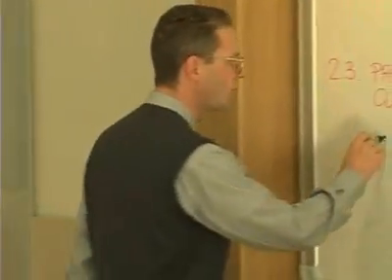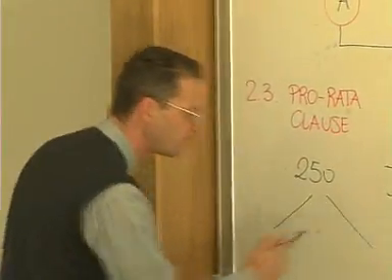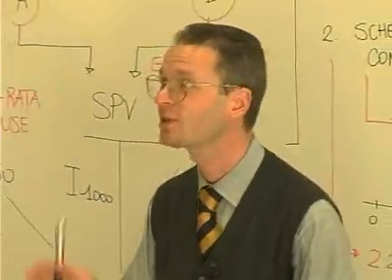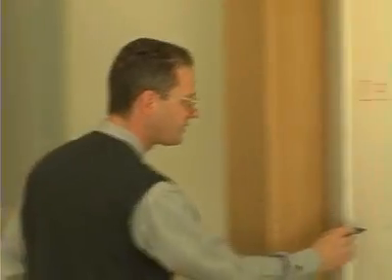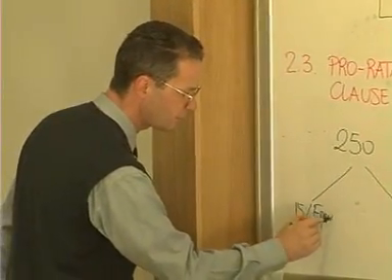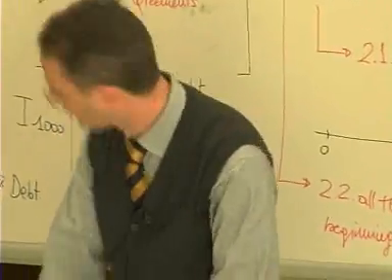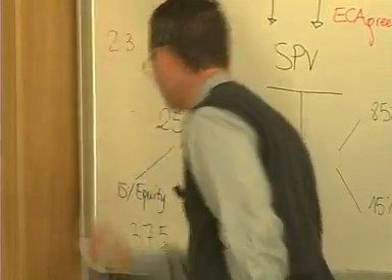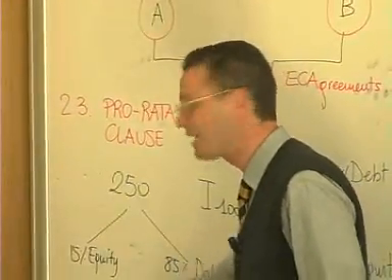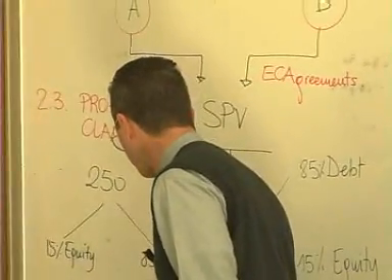Suppose, for example, that I have 4 installments for the payment of this amount of 1,000. Each of them is 250, for example. In this case, you agree that every time an amount of money whose value is 250 is required to pay the construction costs for the project, 15% will be financed with equity, and the remaining 85% is paid through debt. Namely, the 15% times 250 is 37.5, and the remaining amount will be 250 minus 37.5, and so an amount of 212.5.